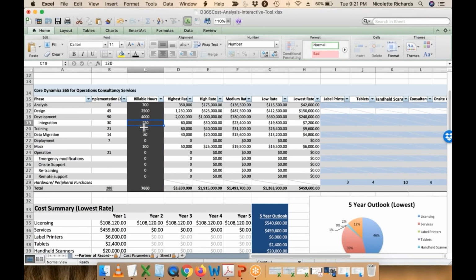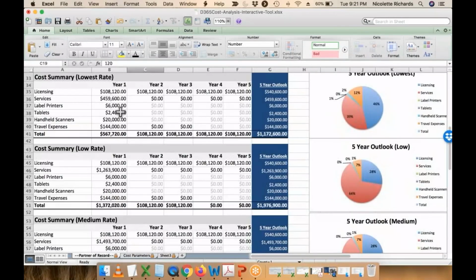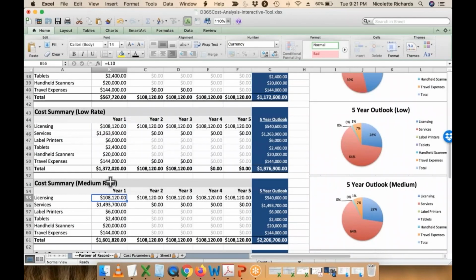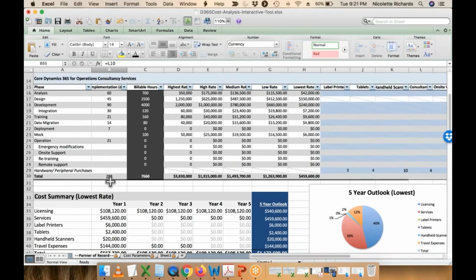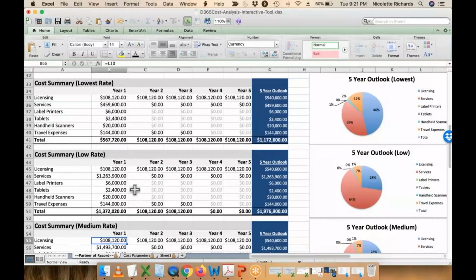So we have these projections here. Going back up to the phase section of the worksheet, you want to take time to plan internally with your team. What are your key success factors? What are the absolute must-haves? Before you bring in the consultants, can you bring your team together and list out the must-have requirements for your organization?